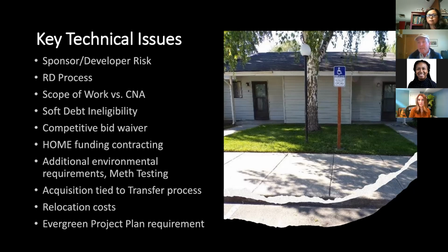So I don't know an easy answer to make these acquisitions move faster, but certainly one of the things you've got to have in mind at the outset is that you better expect a significant period of time and that you've got to have sufficient funding to absorb that risk of the existing mortgage loan being paid down over that period of time it takes to close.